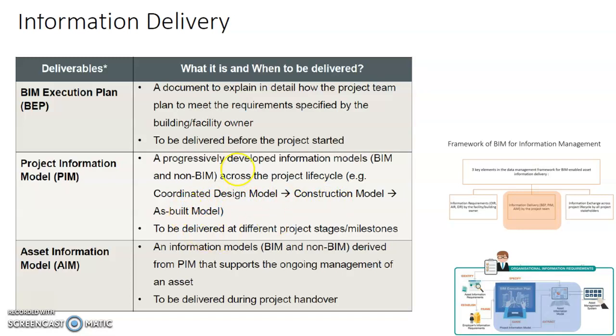So you will need to deliver it at the different project stages or milestones at different levels of detail. Remember the LOD that we talked about? So at different stages of the project life cycle, you will need the model to be created or delivered in sufficient detail so that the stakeholders downstream can take it to do their related work.